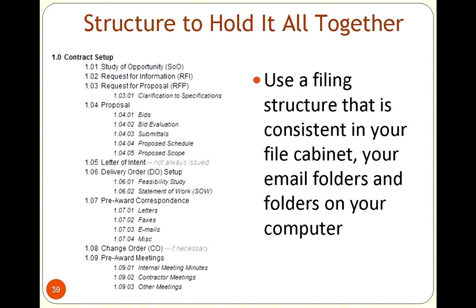And so what I said was, wow, this is great. You've got all of these topics basically broken out by things that needed to be tracked, such as are we getting a proposal from that contractor or other contractors? What's happening with the bids that we received? Did we issue a letter of intent and then we actually awarded the contract? And what's happening with change orders? So we had this whole structure of categories that she put together, and she put them pretty much in the order that a contract happens. And so what I said was, that's great, but she was only doing it for her filing cabinet. That was the issue: okay, now I've got to go to the filing cabinet.